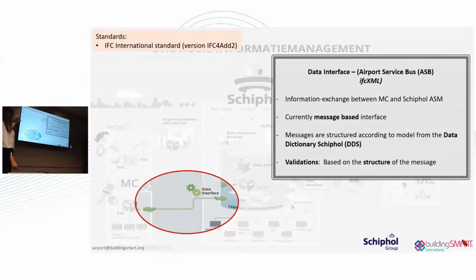So once the project delivers, they are responsible for sending it to our main contractor. And they can actually, during project handover, deny the delivery if it is not conform the ILS or the IDM and the IM protocol. That way, it goes back to the project and they have to fill in all of the information requirements that we originally asked. If the main contractor accepts the project handover, then they will process it in their system,